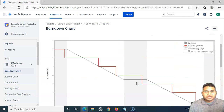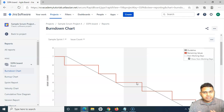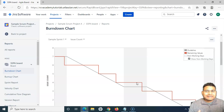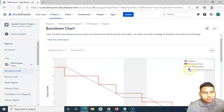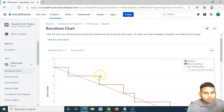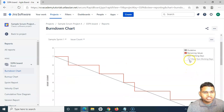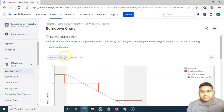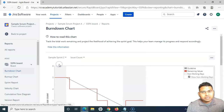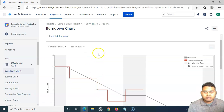The incomplete issue, with key SSPA-23, will be carried forward to the next sprint once this sprint is closed. That is a brief introduction to the burndown chart and how it helps you analyze the overall progress of your sprint. If you want to remove non-working days from the chart, just uncheck 'show non-working days' and those highlighted non-working days will be removed.